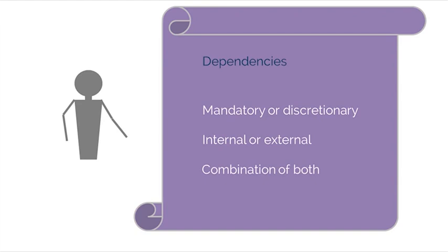External dependencies involve a relationship between project activities and non-project activities. These dependencies are usually outside the project team's control, unlike internal dependencies. For example, you need to ensure that the electrical company has connected the electrical supply before the cables can be tested.